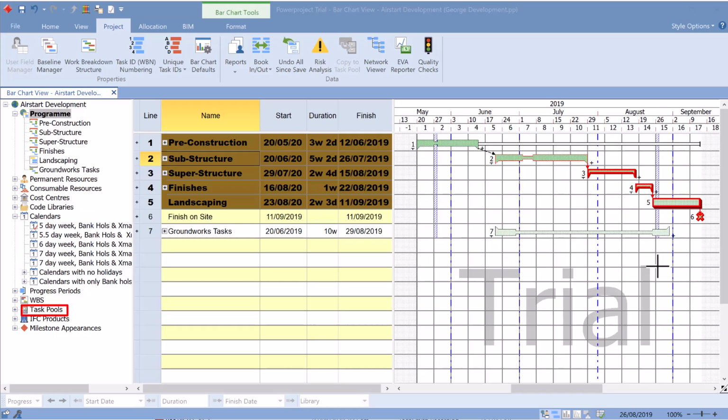If your projects contain networks of tasks that are similar to each other, you can save time in planning projects by creating task pools, also known as fragments and templates. Task pools are networks of tasks that you can use as templates for the creation of multiple, similar task networks within a project. You create a task pool by planning the tasks that are required in a chart or summary group, then creating a task pool from the chart or summary group.